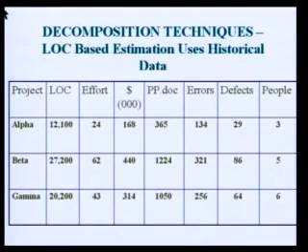1,224 pages of documentation, 321 errors, 86 defects, and 5 people. So you should be able to guess exactly how long this project would have taken after getting the details of effort and the people. 62 person months: one person working for 62 months, and this project has been done by 5 people. So it is nothing but 62 by 5. You can take the positive side and say maybe around 13 months. So as a project manager, the person will say 13 months.